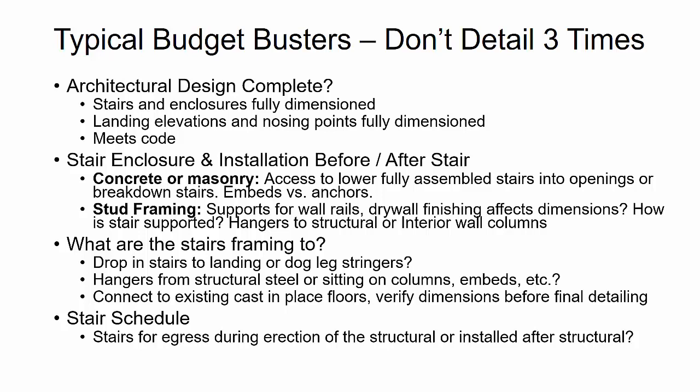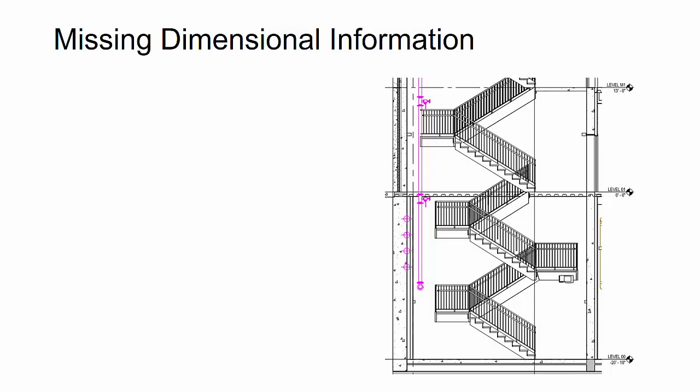So if the stairs need to be used during erection as well as for final use after the project is complete, then the stairs are going to be in a rush at early phases. If the stairs are just being installed afterwards, after structural erection is complete and finishing is starting to go on, then that may impact the schedule to be a little bit later on the project. So that's what's important to also understand about the stair schedule: just how much of a rush and how fast do you need to get these stairs out, and where do you sit in the overall project schedule and scope. All right, so let's dive into part of the sample project I was showing.